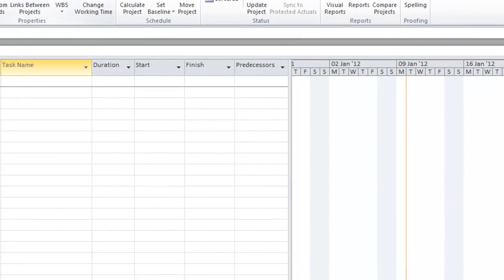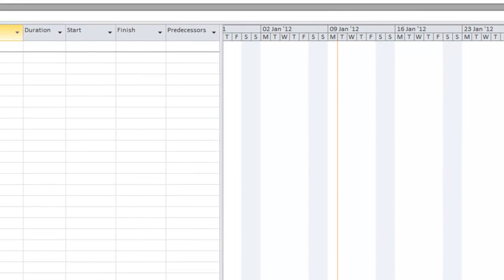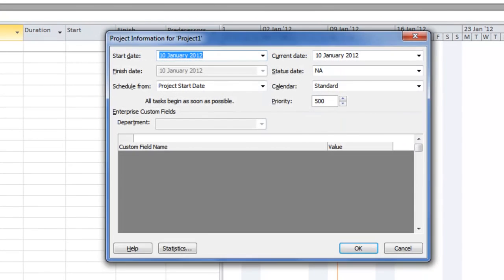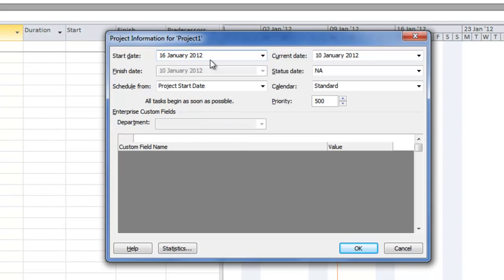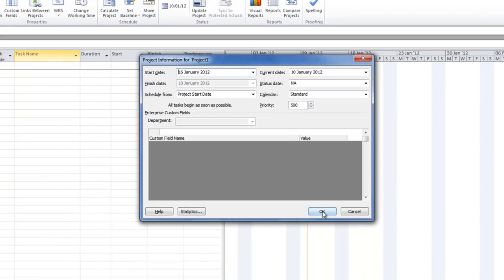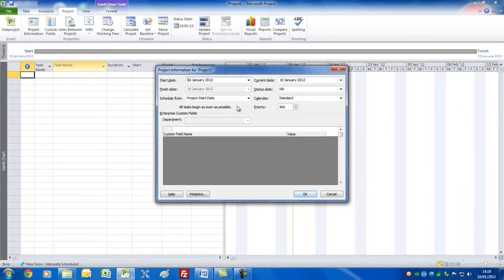For this we go to the Project tab and Project Information. Today's date, I'm recording this, is the 10th of January. What I want to do is set the start date to the 16th of January, just to show you that you can adjust this for some point in the future. So that's good enough for the moment, let's press OK.